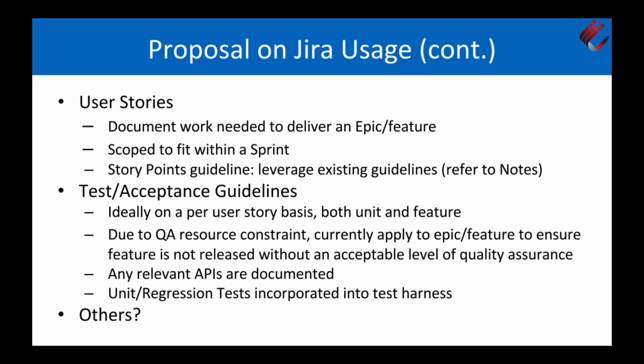The other thing I'm hoping to do, as part of release planning, is this: we're working on a feature, so we're all working together to define all the pieces needed to deliver it. Traditionally, a scrum team works together to identify how many story points each story takes. This way, different people can help each other out as things get tight in order to get things done. So it's not based only on your subject matter expert explaining what needs to be done. As a team, you look at it and say, okay, this is how many user stories, and it provides the average for how long it takes to get something done.